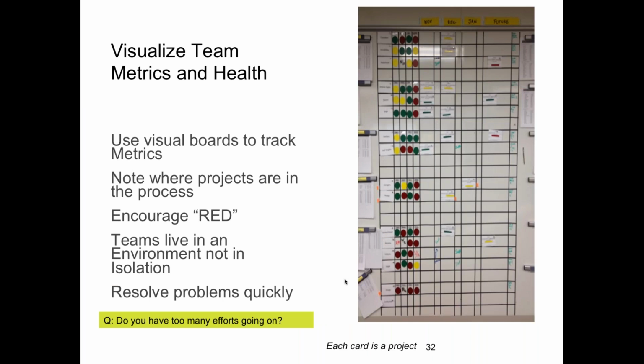Sure, and I'm totally fine if you boil it down to red and green. Could you read the last part about encourage? Yeah, so green was good or on plan, red needed help or discussion, and we avoided saying red was negative. That's perfect. Here the PMO was used to green is good, doesn't need help. Yellow is we think we're trending towards needing help and maybe a discussion is warranted. And red meant we have blockers or issues that are keeping us from working.